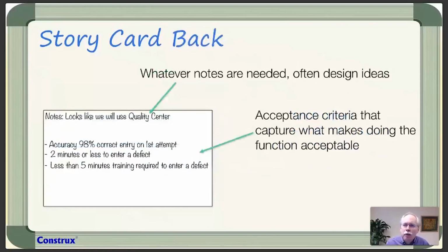All that has to be captured by the human being. And in Scrum, that's the product owner. The product owner has to say, hey, this is where this is going on. This is where it's being used. This is what the people like that are using it. All that context has to be carried in a conversation with the team every time they touch this card. So a complete requirement captures enough of the decision to remind us to have a conversation about the context. It is never enough all by itself.